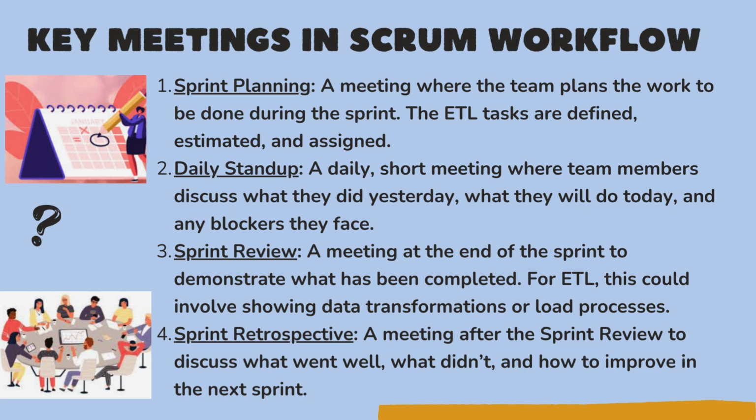Daily stand up: a short meeting where team members discuss what they did yesterday, what they will do today, and whether there are any blockers they are facing. This would be scheduled every day, a team meeting of 15 minutes or so, where each individual can speak for 5 to 10 minutes and discuss their issues and concerns.